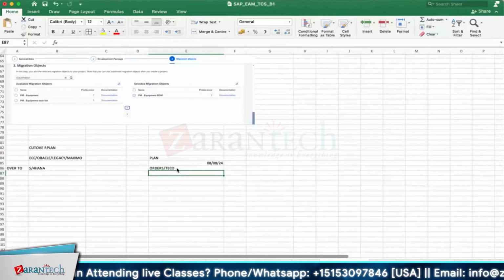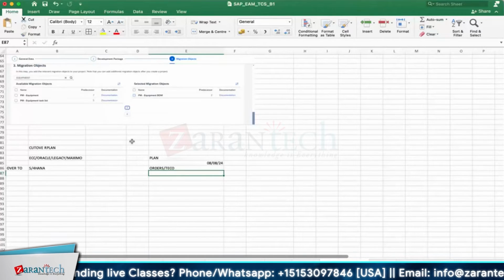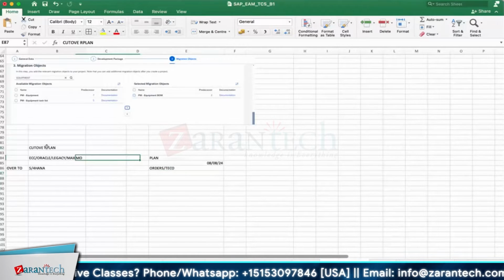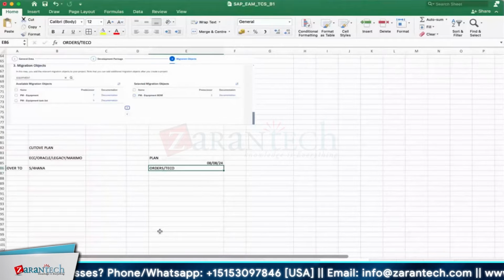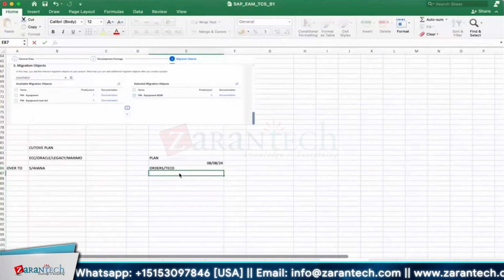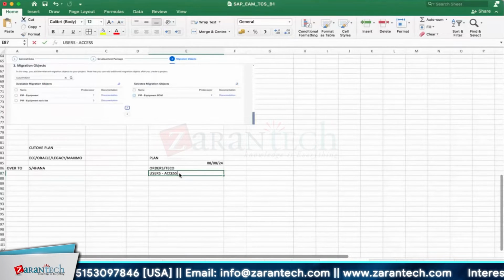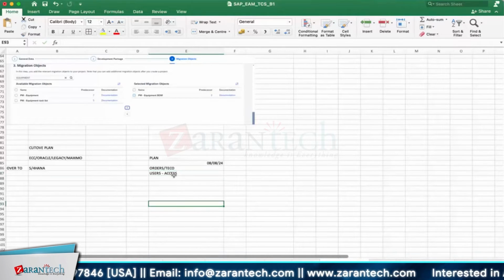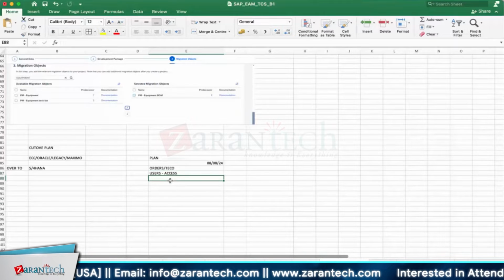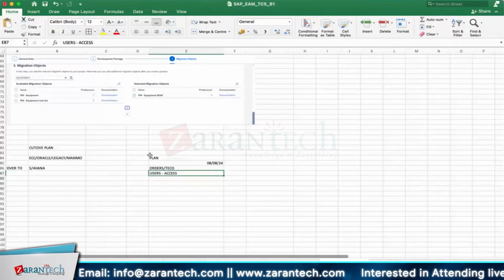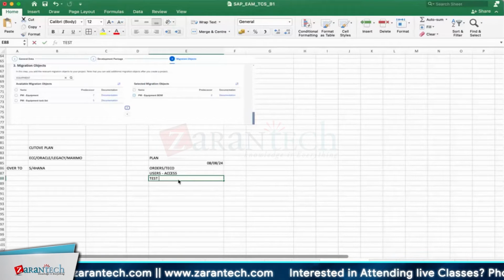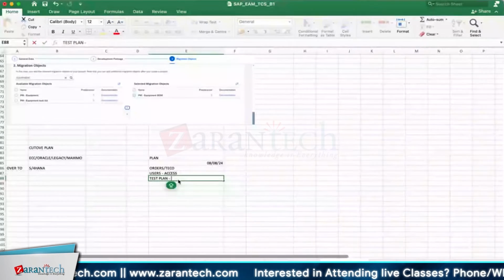The finance will take part again. For them, the cutover plan is different. For us, it should be technically closed, we cannot change all those things, all pending orders. Okay, this is one thing. And another thing, end users should have access. Because going for go live and they don't have access to certain things like creation of the orders, all those things should be tested before. Again, that will also come as a cutover activity test plan, say UAT confirmation.